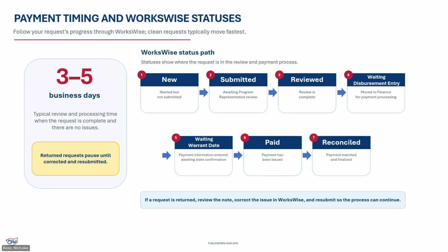Nick, while you're waiting, there's a question. If the CEO or CFO is temporarily out, can the acting CEO or CFO sign the disbursement request? Yeah, that's typically fine. If it's just a one-time thing, that's usually fine. It just needs to be notated on the disbursement request.